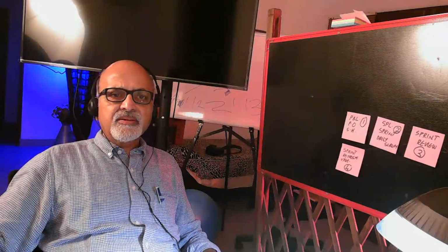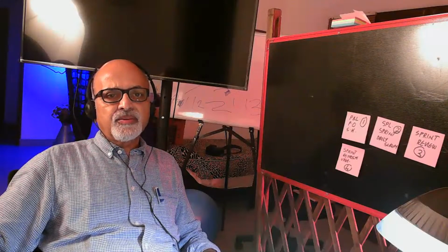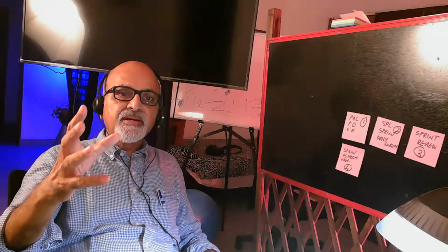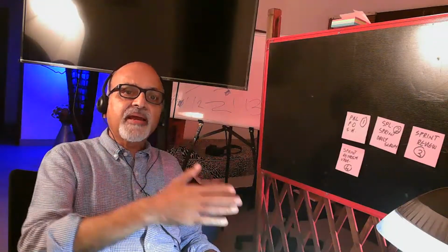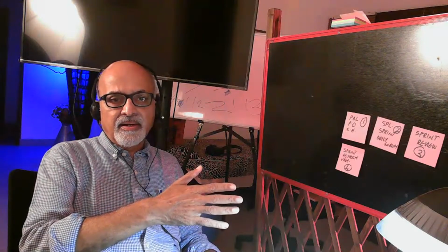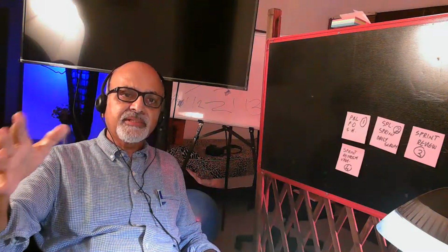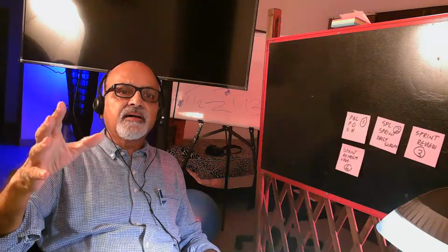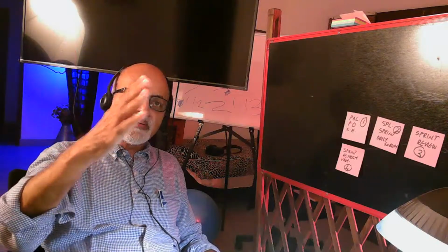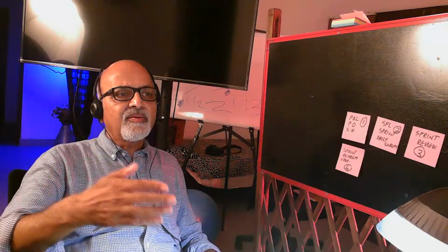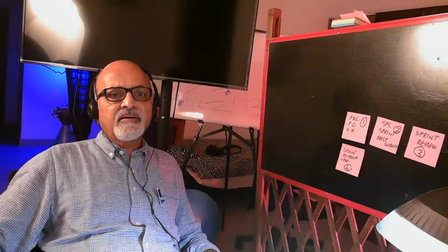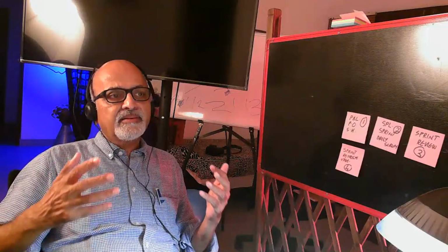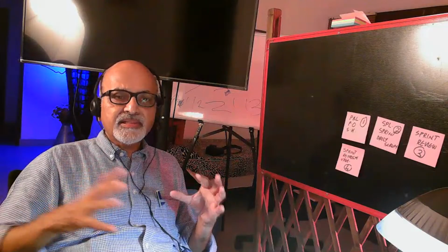It is a good practice to write the acceptance criteria of the features during the planning meeting itself. So during the sprint review meeting, these acceptance tests are run again on the completed features, and if all the features pass the agreed upon acceptance tests, then we say the sprint is successful.